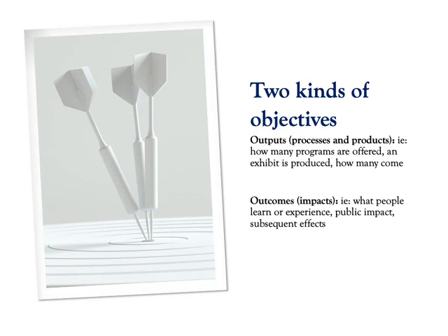As you generate goals and objectives for your project, specifically for goals, try not to come up with more than 2 or 3. 3 seems to be a kind of magic number, 4 at the most. And then with objectives, keep them, again, 2 to 4 under each goal. Don't make it overly complicated.